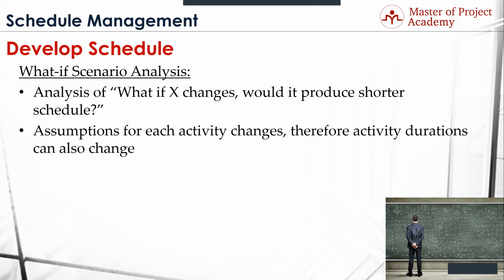based on assumptions changing or whatever the reason is, the tool you want to think of is the Monte Carlo analysis. It is an official tool that's available out there. There are many Excel add-ons that simulate a full Monte Carlo analysis. And I'm going to give you a short version of what a Monte Carlo analysis is. It's basically a tool that analyzes your data that you collected from your PERT numbers. So you have to have estimated with pessimistic, most likely, and optimistic. It takes all of those values for your thousands of activities, and you have to enter them into a computer, so you got a lot of data entry to do.